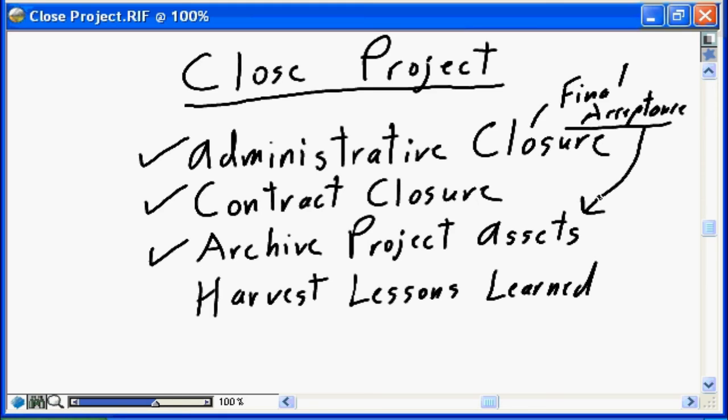future members of your organizations to go back and say, hey, that project that Steve did 2 years ago, it produced a system test plan. I hear that was a really good system test plan. I'd like to get a copy of it. Without proper archival of the project assets, no one has a clue where that system test plan will be. And again, yet another project in your company is starting out with a blank piece of paper as opposed to having a tried, proven, reliable, quality asset that they can reuse and reapply.